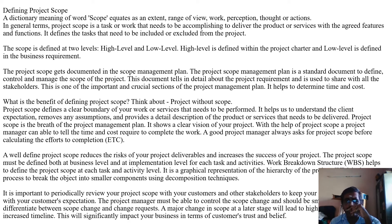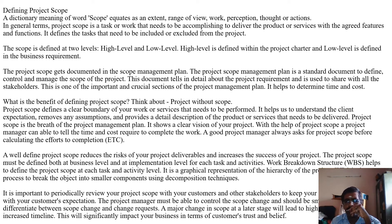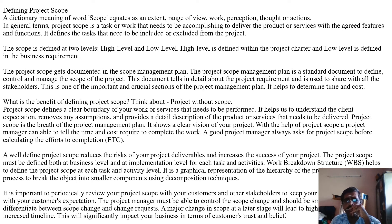The scope of the project must be defined both at the business level and the implementation level for each task and activity. The Work Breakdown Structure, or WBS, means all activities can be broken into small pieces and measured in total. The project is broken down or split into separate phases, with milestones marking when complete activities have been done. WBS helps to define the project scope at each task and activity level. It is a graphical representation of the hierarchy of the project, using decomposition techniques to break objectives into smaller components.